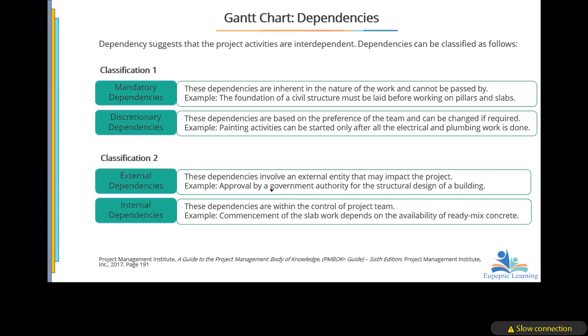Another one is the internal dependencies, which are within the control of the project team. The commencement of the slab work depends on the availability of ready mixed material. Even within the team, maybe there's one engineer that checks that this concrete that has been mixed, or this slab, is fit. Those material engineers come and check.